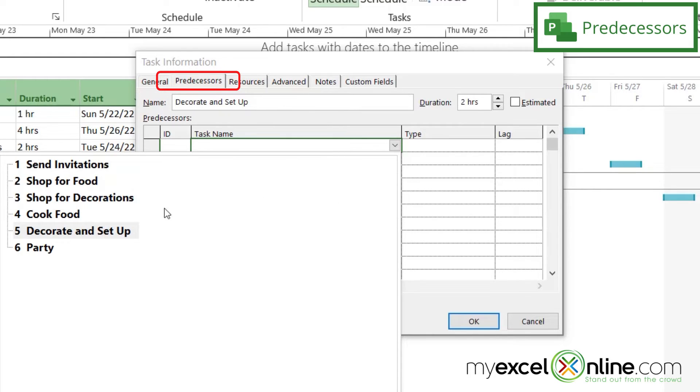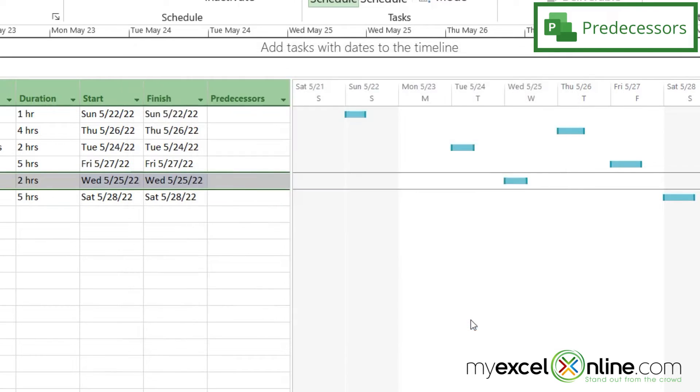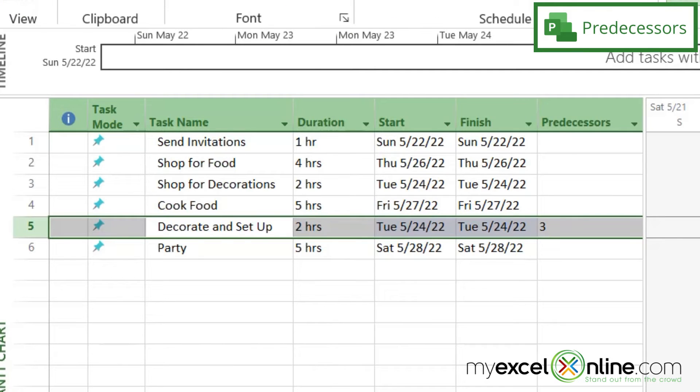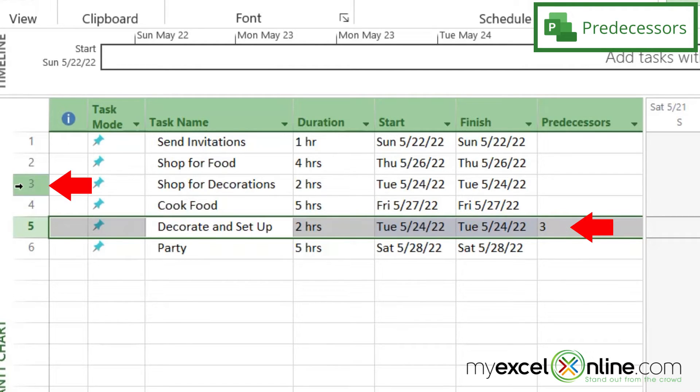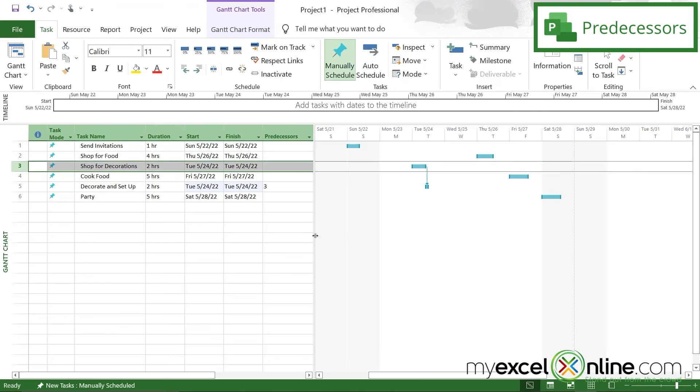So in this case, I would need to shop for decorations before I can decorate. So I'm going to click on that and say okay. And when I do that, a couple of things have changed on the screen. Under predecessors, you can see that a three has been put in there, and that three corresponds with this three up here, shop for decorations.